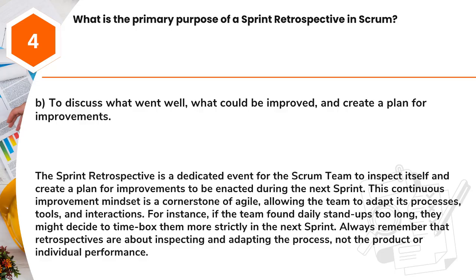For instance, if the team found daily stand-ups too long, they might decide to timebox them more strictly in the next sprint. Always remember that retrospectives are about inspecting and adapting the process, not the product or individual performance.